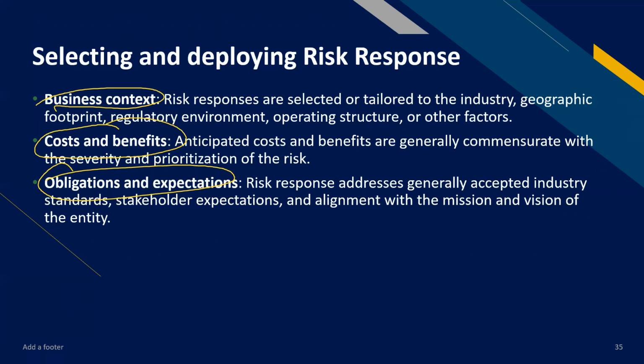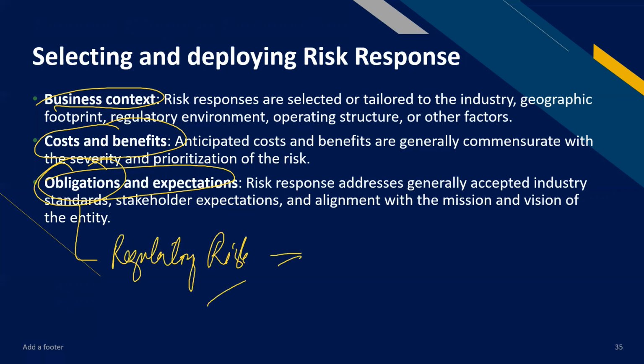So risk responses generally address accepted industry standards, stakeholder expectations, and alignment with the mission and vision of the entity. So usually, for example, regulatory risk, the risk response is in line with the regulations of the entity. You cannot initiate a risk response that you cannot do based on regulations, right? So that's something that you need to consider in terms of designing the risk response.